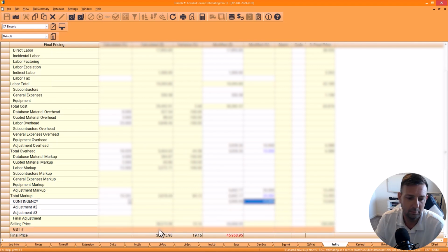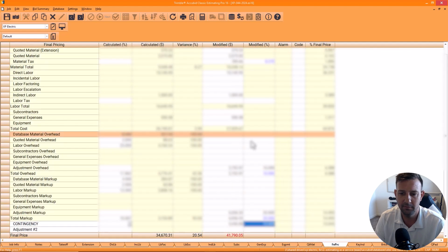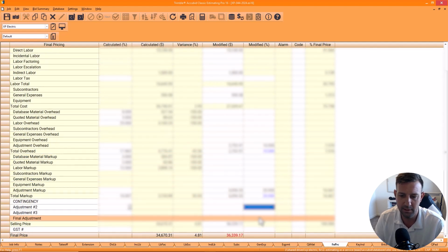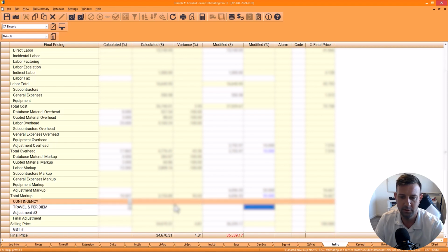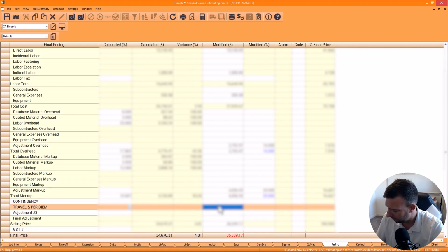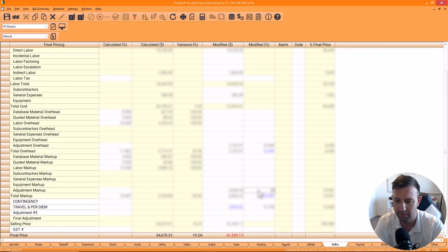Well, look at it like this. How would another contractor price it? Would they go maybe 55 an hour and then final price, let's say there's no contingencies, and then they add travel and per diem, which for a week anyway, is an extra $5,000. And then if they made their profit margins healthy, $42,000, something like that, I bet is the number.